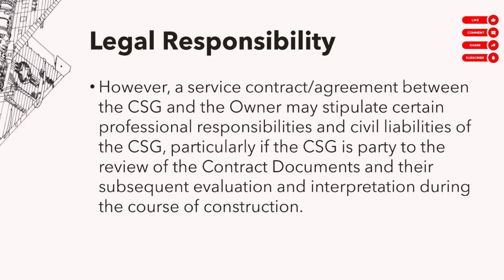Okay? However, paano kapag kunyari nag-collapse yung building, so may civil liability, na-trace sa design, so may civil liability si designers or si architect of record. Pwede bang madamay yung CSG? Ang nakalagay sa standards natin, kung nakalagay daw sa kontrata ng CSG or ng full-time supervisor na damay siya sa civil liability, then pwede siyang madamay.